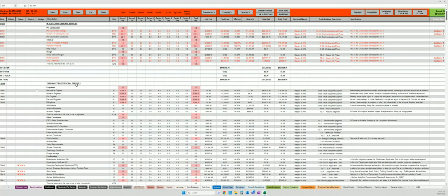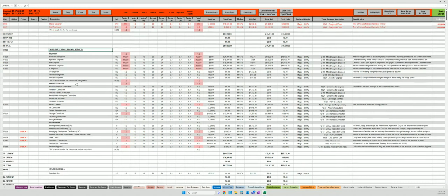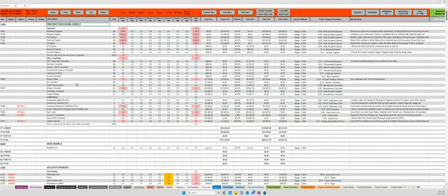So from there, we're now going to look at the portions of a cost plan, just so you can understand how it's broken up. So the first thing is we have a line identifier. Every line is identified uniquely. It is consistent through all the reports. So when you're combining multiple reports, like a detailed report and a specification report, the line identifier links those lines together. They are auto-calculated. They're always sequential.